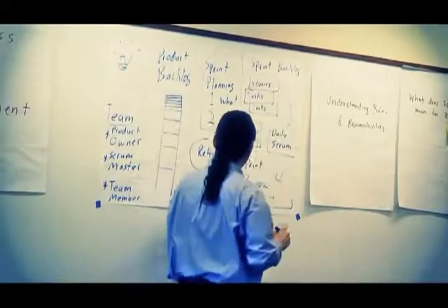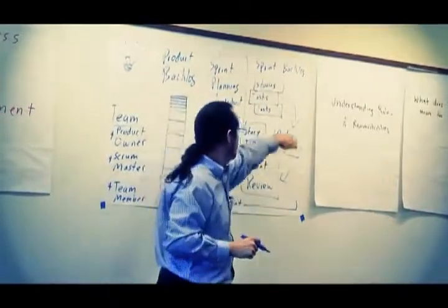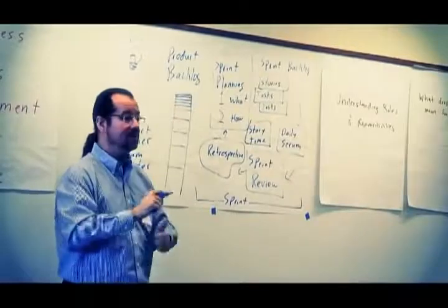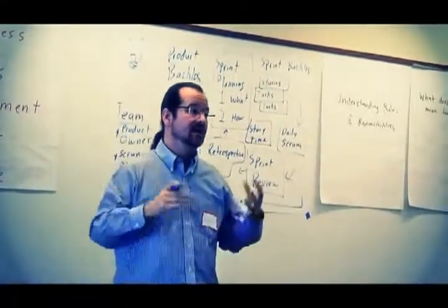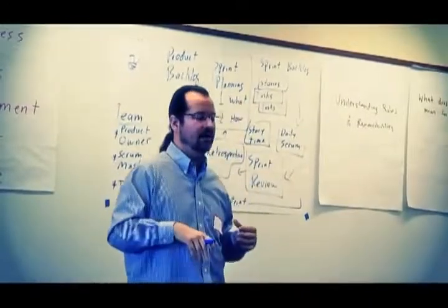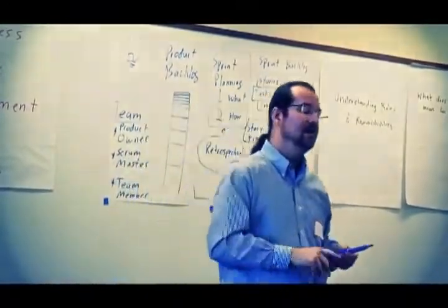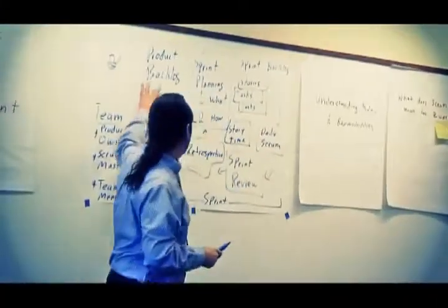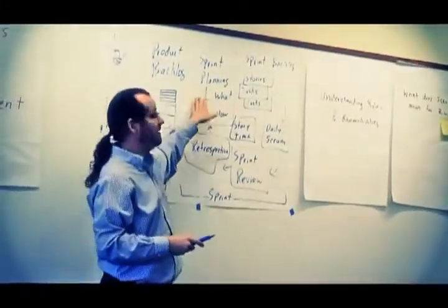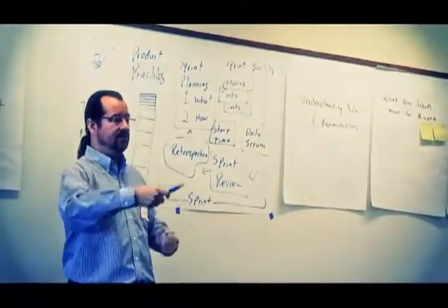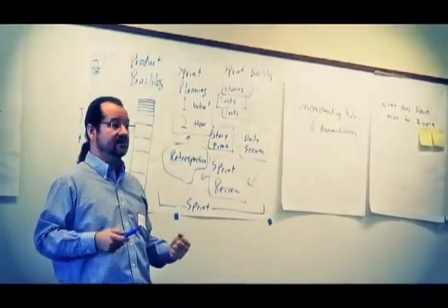And this is a meeting where we take a little time away from the current work and we look at what's in the backlog. Put estimates on things that don't have estimates, refine acceptance criteria, break big stories into little stories, so that the top of the backlog will be in good shape for our next sprint planning meeting. And that, in 13 minutes and a few extra seconds, is Scrum.